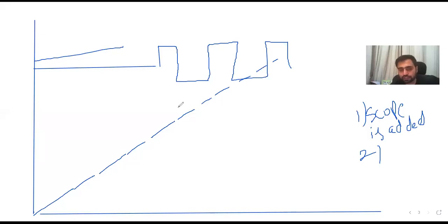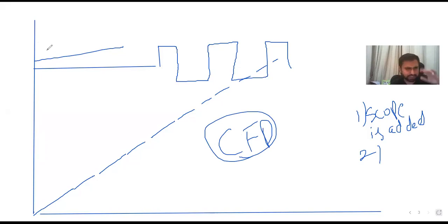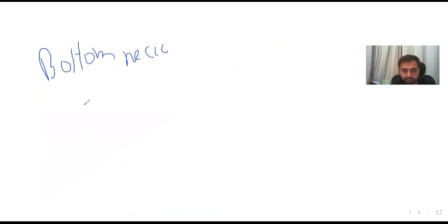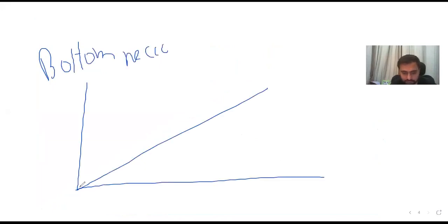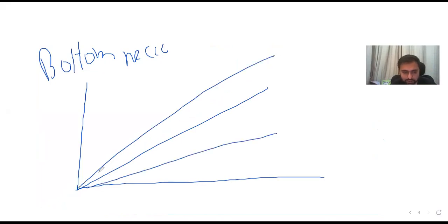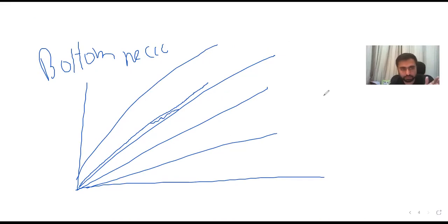A very important thing that we should know about the burn up chart is that we can make a cumulative flow diagram from it. What is a cumulative flow diagram? A cumulative flow diagram is made from the burn up chart and the Kanban board, and it shows us what our bottlenecks are. If we have a burn up chart showing all the areas, the thinnest area will be your bottleneck. So that is the burn up chart converted into a cumulative flow diagram.